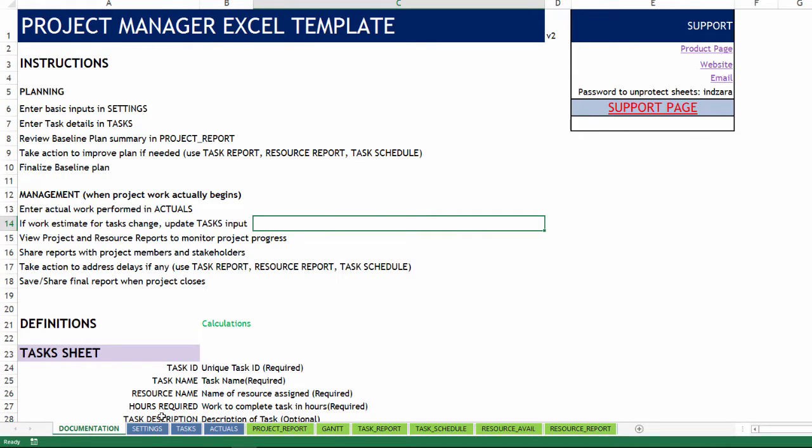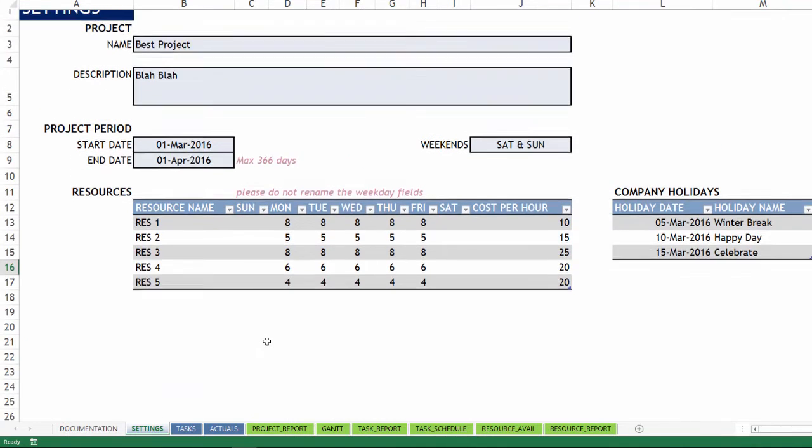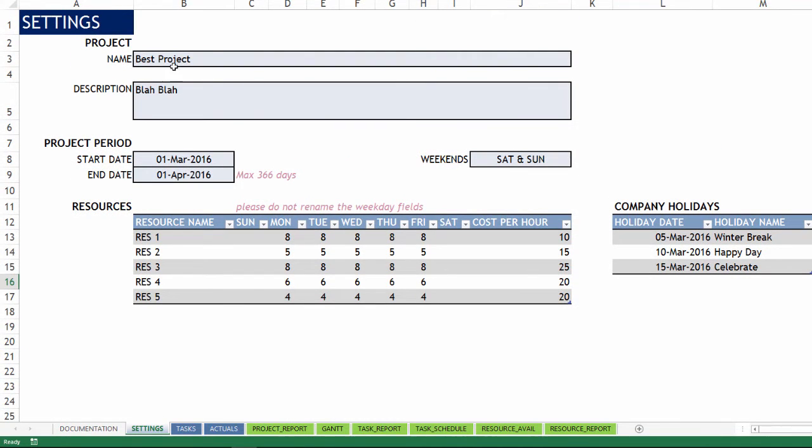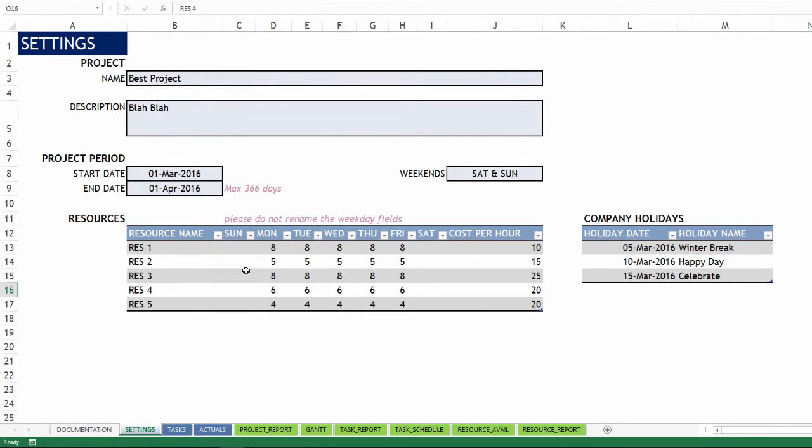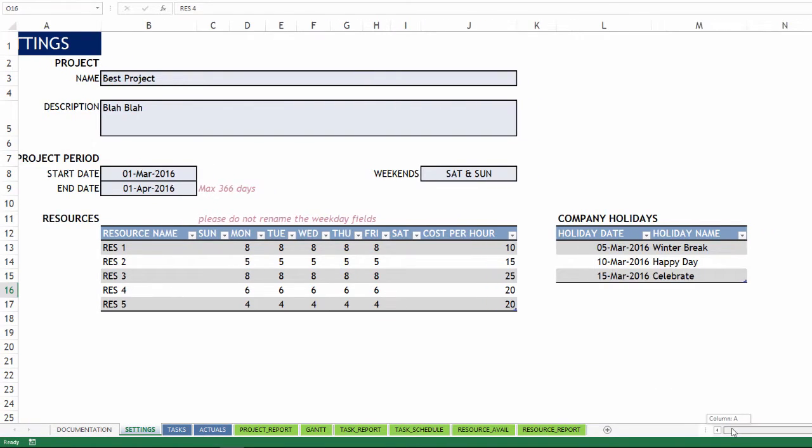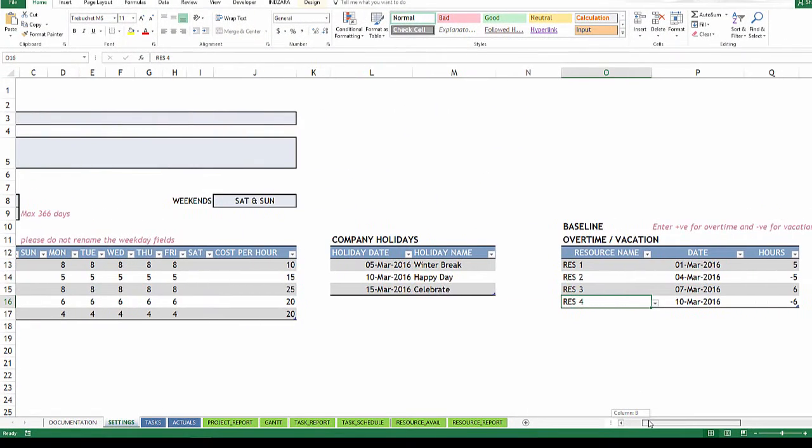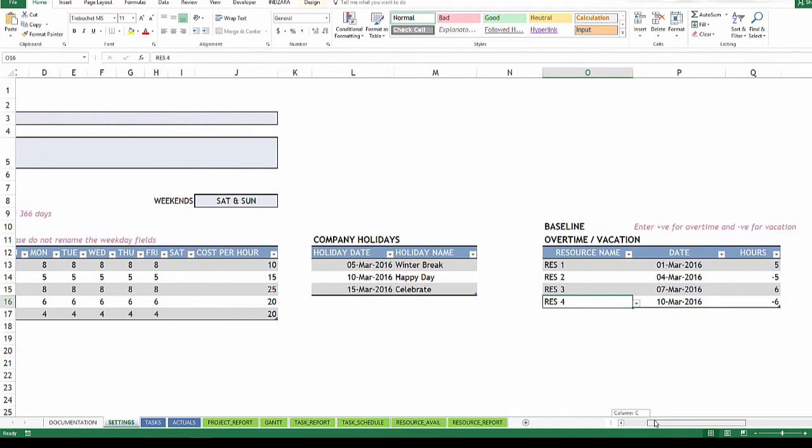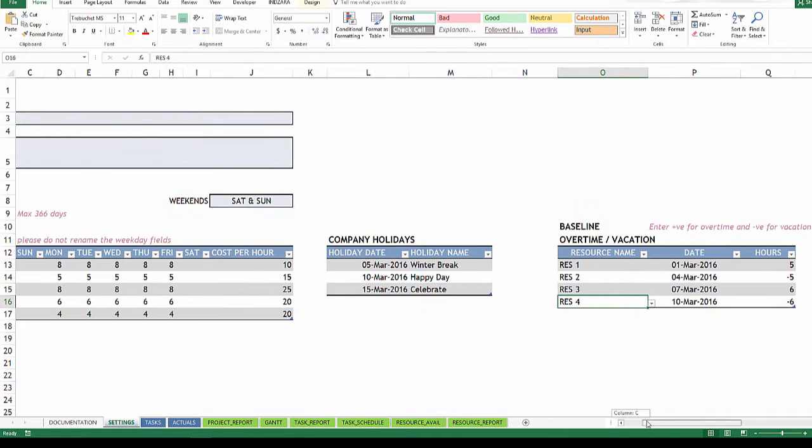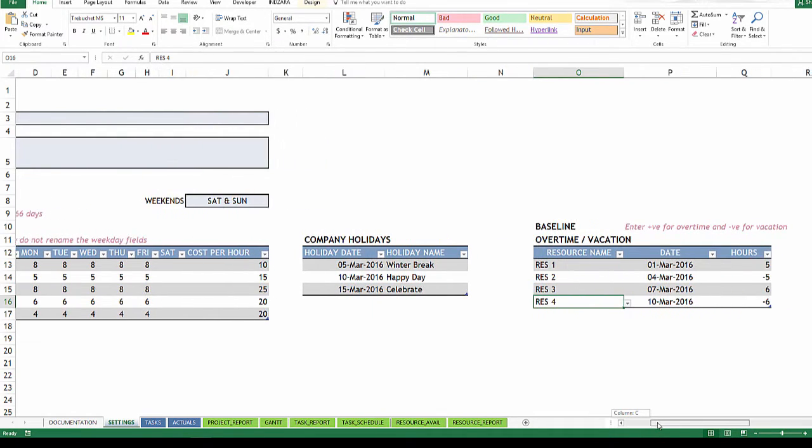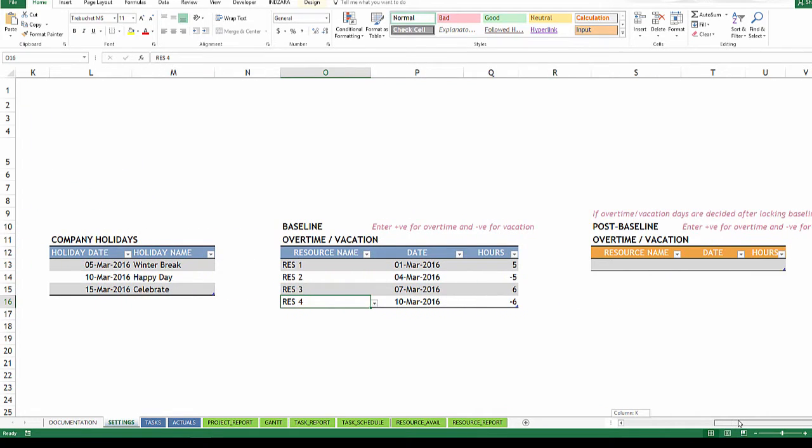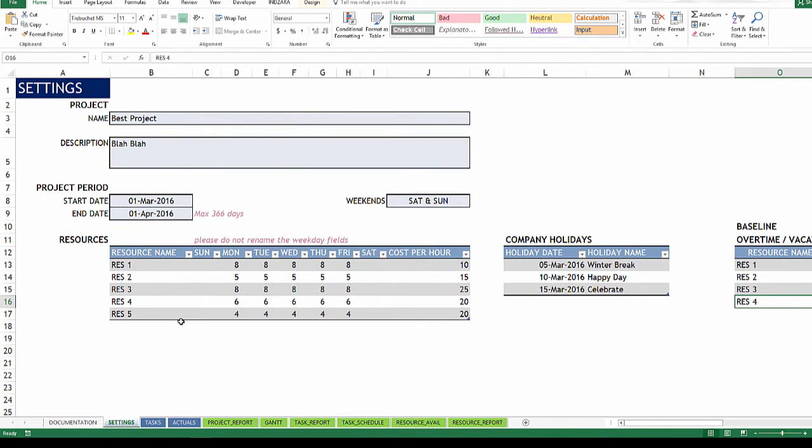The next sheet is the setting sheet, which is where we enter the basic information about the project, the period of the project, list of resources that we can enter. The template can handle 30 resources and then the list of holidays that we have in our company for the project period and any overtime or vacation that our resources might be taking during the project period. And this is used for baselining or creating the baseline plan. After the baseline plan is locked, if any overtime or vacation days are taken, then you can enter that in this little table. Now, the unit of planning in the template is number of hours. So you can enter everything in number of hours of work.